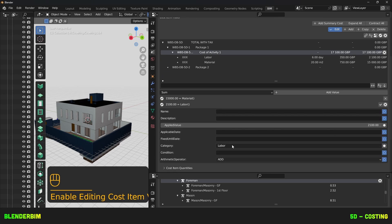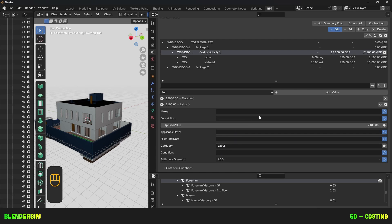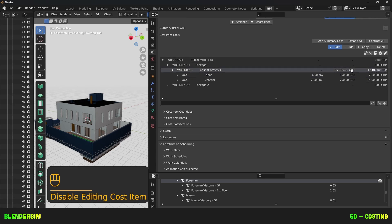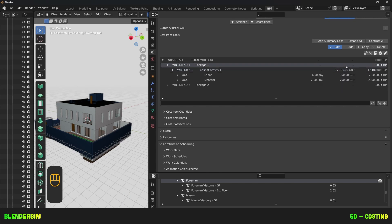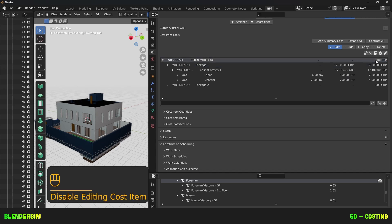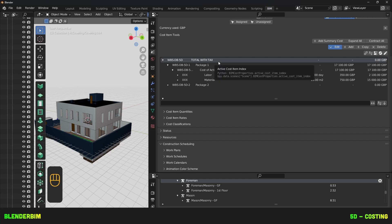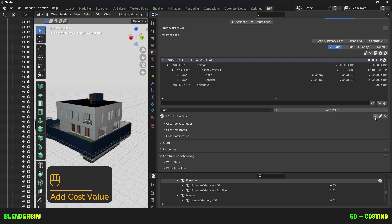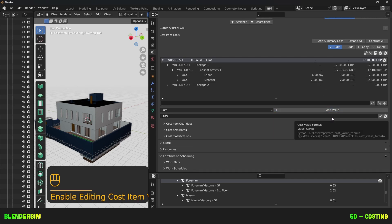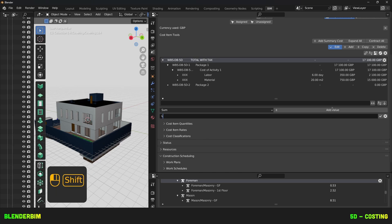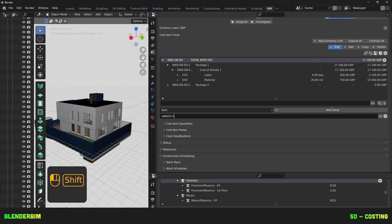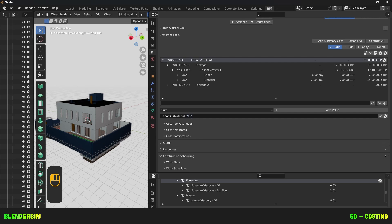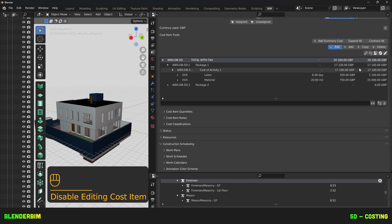Now for the parent cost we'll add a sum and another sum. And we'll then edit each of these formulas to the material and labor. If you were to edit the attributes you would read here that we have a category of labor and an applied value. Which is basically just calculated from what we have down here. Now we'll do again the same thing for the package. And now finally for the root item which is where I want to show my total with tax. I'm gonna create another sum. And this time in my formula field I'm gonna write labor plus and in parentheses just make sure you have them because otherwise it won't work as expected. Material times 1.2. So the operands you can choose is plus, minus, divide and multiply. Just have these parentheses otherwise the math won't work. Press ok. And there we go. We have a total with tax.